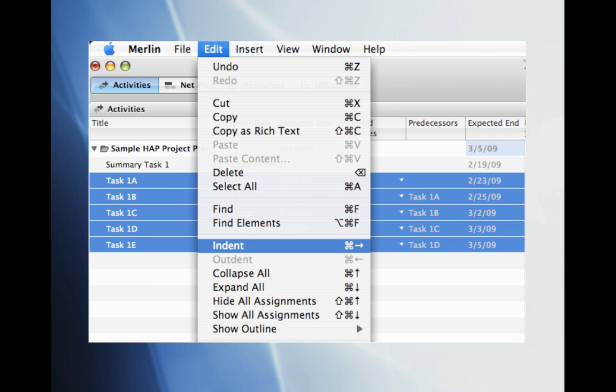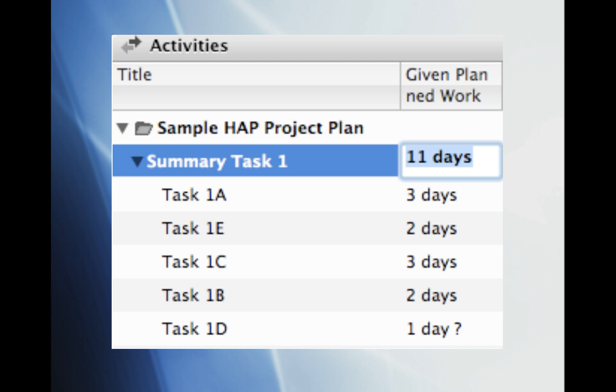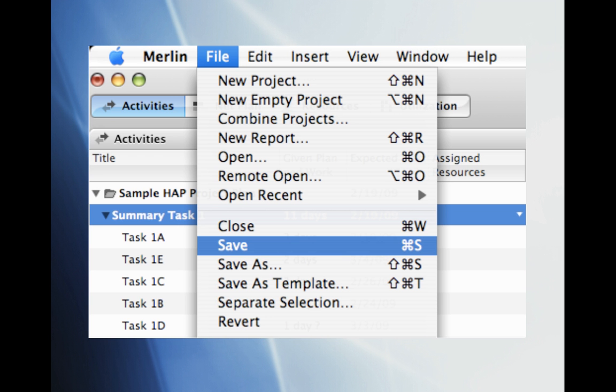The next thing we're going to do is to format the worksheet. Formatting the worksheet will make it not only easier to read but also format the tasks accordingly so that the reader will know that all 5 tasks really belong under Summary Task 1. We can do this by highlighting the 5 tasks and click on Edit and then Indent. You can now see clearly that the tasks belong under Summary Task 1. Be sure to add up the days for each task and enter it into the Given Plan to Work column for Summary Task 1. Let's go ahead and save our work again.